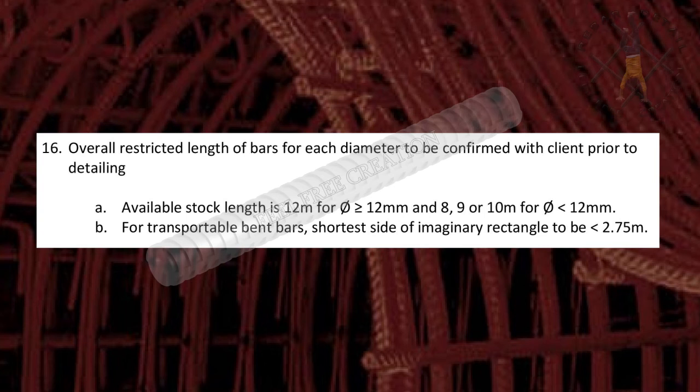Point 16. Overall restricted length of bars for each diameter to be confirmed with client prior to detailing. Suitable stock length is 12 m for dia greater than or equal to 12 mm, and 8, 9, or 10 m for dia less than 12 mm. For transportable bent bars, the shortest side of the imaginary rectangle to be less than 2.75 m.